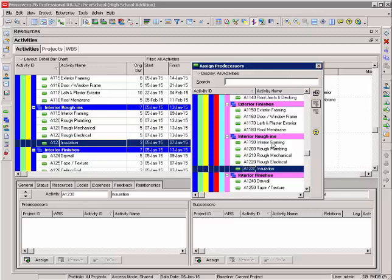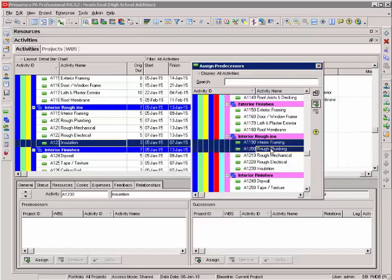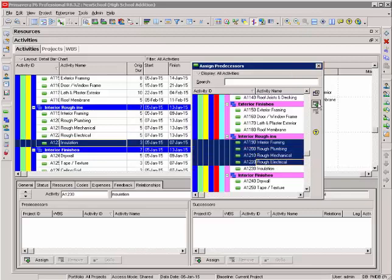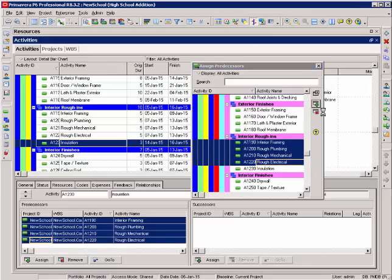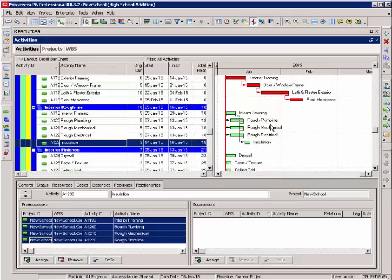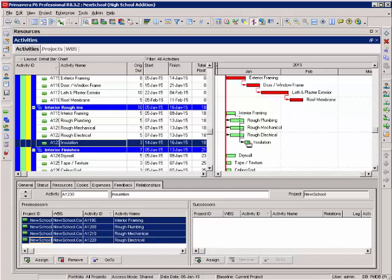So there's my insulation activities. There's all four of those activities. I select them and add those relationships to insulation. Once again I'm building a small schedule with just these activities within this WBS element. And each one of these has a start and a finish activity.